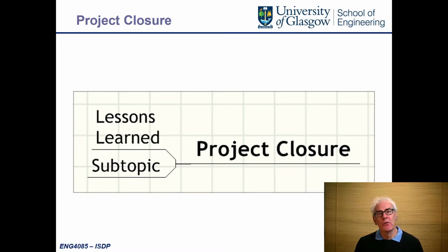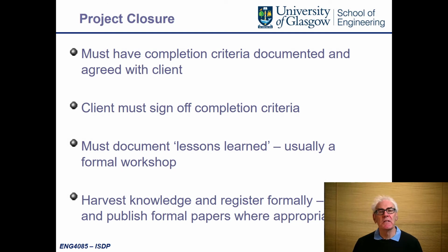I said earlier that there are 4 parts, and project closure is probably the least attractive part of doing any project. Project closure is making sure that everything that you've delivered to the client has been properly documented. It could be a data sheet, it could be an operations manual, it could even be making sure that all the invoices are paid.